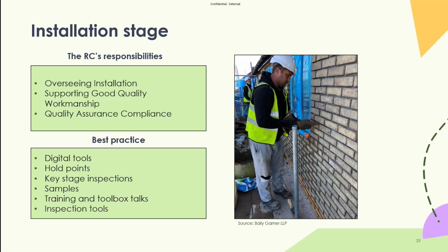And before you crack on with any render or brick slips, myself as a retrofit coordinator is going to attend site and make sure that I'm satisfied that the spacing and fixing details have been met. There's not large gaps between the EWI boards. And often if you follow that approach of the first time you do something, you go over it with a fine-tooth comb, it'll then inform the next properties that follow on, and it'll almost become business as usual with that quality idea.